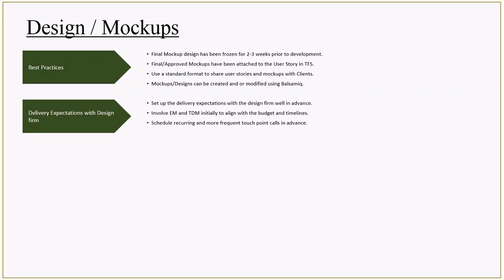Final and approved mockups need to be attached to tools such as TFS, for each user story at the backlog level, and always use a standard format to share user stories and mockups with the client. Usually in firms, people use SharePoint as a common location where they upload them, and it has version control. So if somebody makes changes, you will be aware of it.